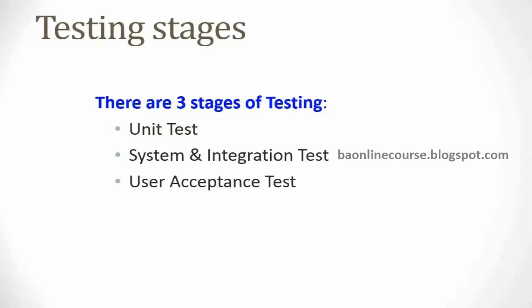So the customer would test it again, right, to make sure that whatever requirements he has given in the BRD are working correctly, and he would test all those things as part of the UAT. And once the UAT is completed, then the customer would say, I'm good with this solution, I'll accept this. That is when the operations team would take over the application and give access to the end users, right? So that is the process involved in testing.